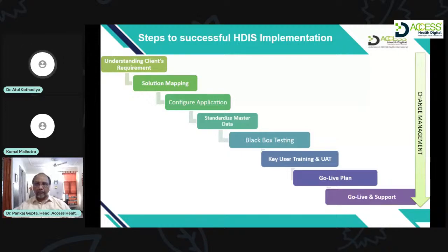Here it is the biggest lab, where around 25,000 samples were processed every day. Huge lab. When we started getting requirements, we thought that Big Bang was not the right choice for this kind of setup. So we decided first the registration department, then the accession department, which collects samples either from walk-in patients, from their clients, from their collection centers, or from other network hospitals or labs.